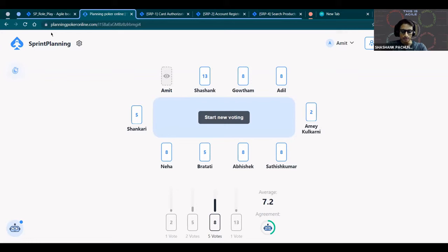Considering all these aspects, the efforts required, and also story slicing which could be needed in case we get much more details from Amit and the customer, if we slice that story into smaller pieces, then I think we can go down from 13 to maybe 8 or 5, depends. But again it varies with the acceptance criteria on the stories.